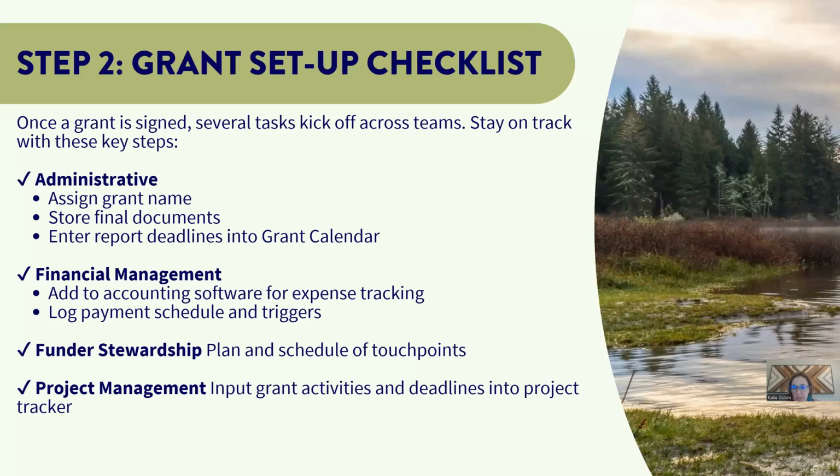And finally is the project management component. So you want to integrate this grant into your program team's workflow by logging key deliverables into a project tracker, whatever system they might have, to track and manage programmatic work. And that really allows you to, similar to the finance piece, see progress and catch activities that are off course early on.